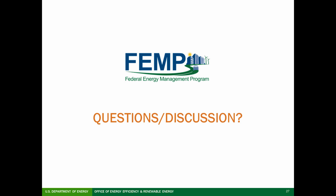My next question regards how does retuning differ from retro commissioning? And I'm going to let Dave Hunt answer that one, please. Thank you, Ann. Retro commissioning and recommissioning can encompass a lot of procedures. They may address HVAC, lighting, other control systems, water, or even envelope systems. And when we hear of recommissioning, we tend to think of that in terms of functional testing, making sure all the equipment is working correctly. Not all buildings need all that level of commissioning, and there may be cases where buildings really need a recommissioning type focus on the control systems. And in those cases, that's where retuning is applicable. So think of retuning as a subset of retro commissioning to consider when you have building automation systems.